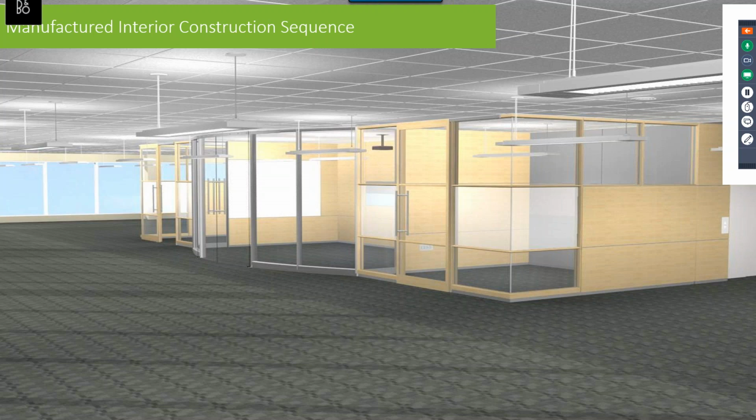Can your system also be used as a half wall to create a workstation model? Yes, it can. And something that I would like for you all to understand, this can be purchased out of either your construction budget, so under the general contractor materials, or it can be FF&E. I'm running into some projects now, and I ran into this myself on my own projects, where the capital budget is tight and you need to offload something in order to finish out the project in a way of your choosing. Maybe you end up shelling a space, and I always found the FF&E budget a little bit easier to replenish over time. Purchasing these types of materials from the FF&E budget may allow you to finish a space in a way that you would not have had you pursued it conventionally.